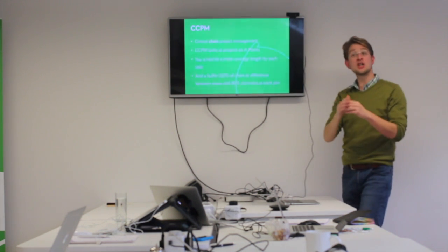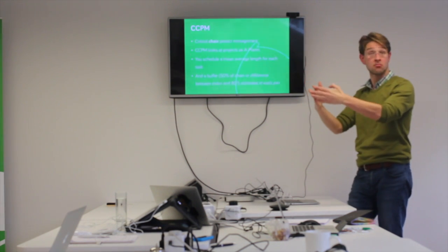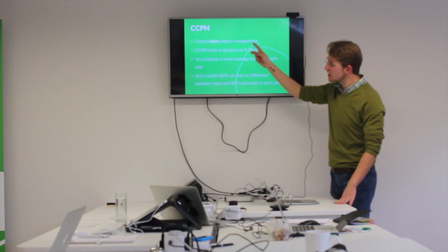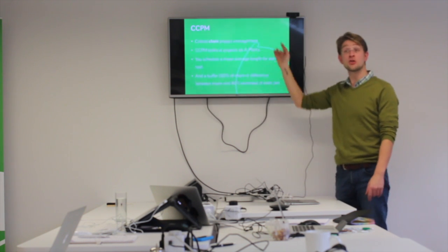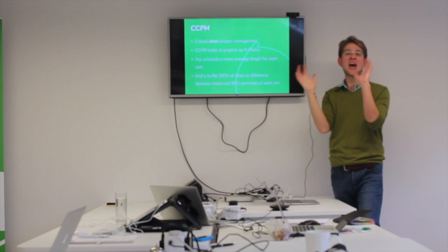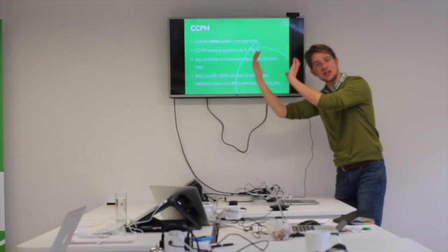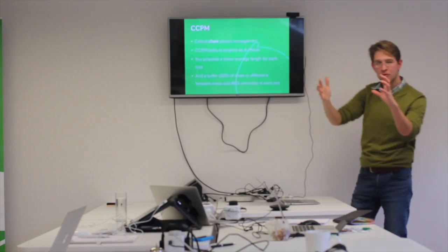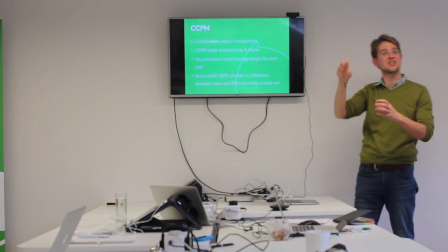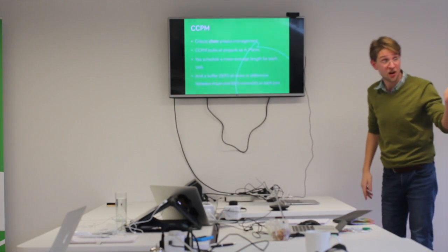So that means that every time 2 different work streams come together, you're going to have a buffer, and you're going to have a buffer at the end. So there's stuff in this which is a little bit like the traditional scheduling of projects, which is that you say, what do I expect on average each of these processes is going to take, and then you stack each of the bits of work backwards from the delivery deadline. And then you look at the ways in which the different chains have to meet, so that you end up with a date where you have to start, right?